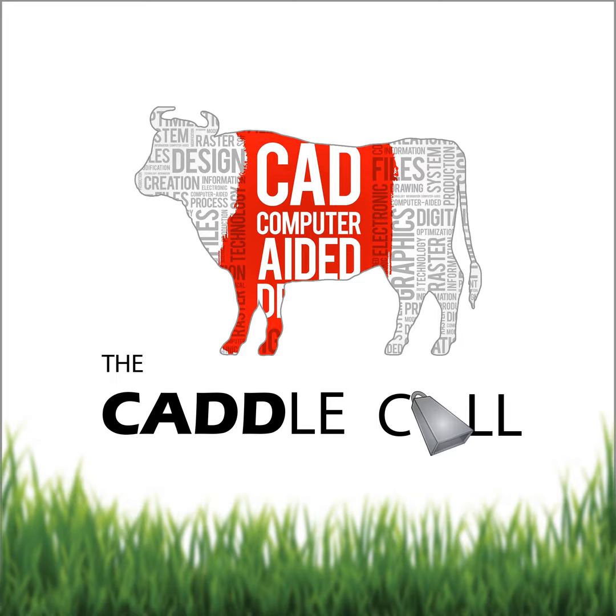I also think working in a CAD system like that gives you a really solid base for your as-builts down the road on the job, right? It's a lot easier to open up a drawing file and modify it with your own setups and designs to show your field changes than to try and get away with submitting some hand sketches, or trying to go back and create something from scratch on a sketching or markup system, right? Those are really time-consuming and expensive processes, right?